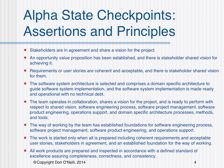As the twig is bent, so grows the tree. To get your project off on the right foot, expectations should be set and evidence should be sought based on the following alpha state checkpoints. Number one, stakeholders are in agreement and share a vision for the project. Number two, an opportunity value proposition has been established and there is stakeholder shared vision for achieving it. Number three, requirements or user stories are coherent and acceptable, and there is stakeholder shared vision for them.